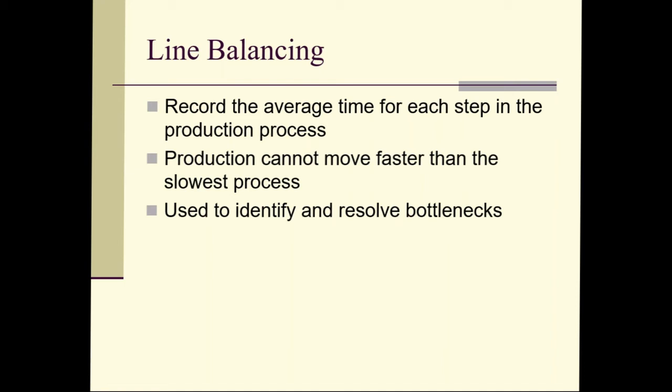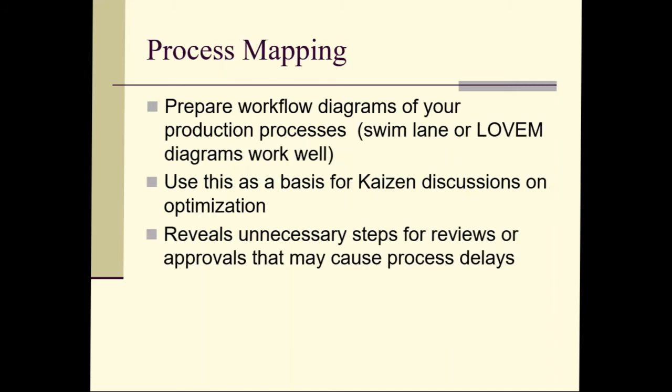Right? This also helps us figure out what the bottlenecks are. The steps that have the slowest measurements for their production time for that step are the ones that are bottlenecks and that may benefit from automation or more resources, etc.